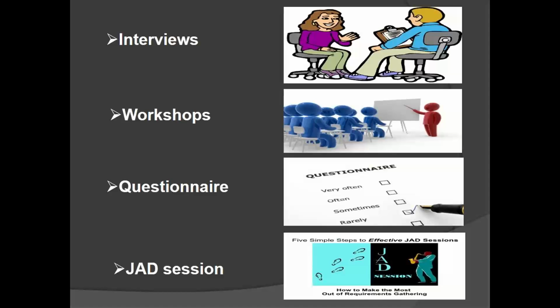Then the next one is questionnaire. Another requirement gathering technique is done through a questionnaire. We use this technique when your client has many branches in remote areas. Let us say your client has nearly 300 to 400 branches located in remote areas, or when you want to gather requirements from 1000 or 2000 stakeholders. In these cases, we use a questionnaire.